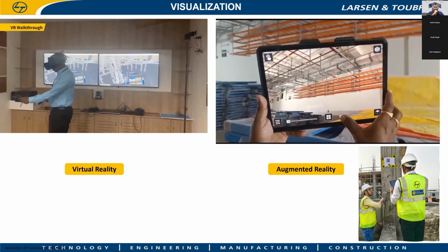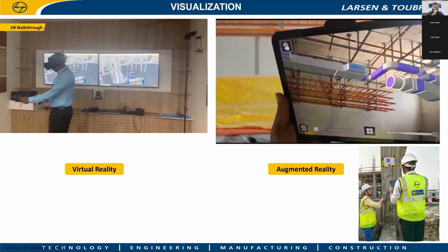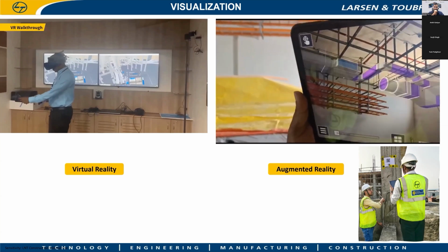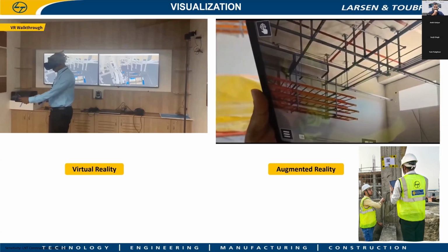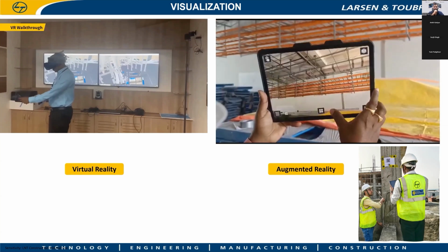To ensure your wall opening size, you can bring your MEP model into the AR platform and superimpose it on the actual site. If any design coordination is required, you can do it in advance, and this can avoid rework and wastage at site by deploying AR.